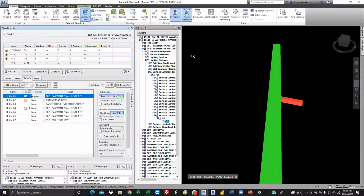Yeah, that's why before the 5D analysis is done, BIM coordination must have been done. This clash detection is a process of BIM coordination. It's a process of coordination during the inception period of a project. It's a process of coordination before it is issued to the cost managers to work. It is advisable for the clashes to be resolved first.